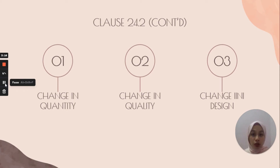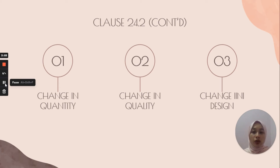Number two is the change in quality. There is an increase and also decrease in quality in terms of the materials or items used. For example, the SO requests the contractor to change the grade of concrete for a column from grade 25 to grade 30.